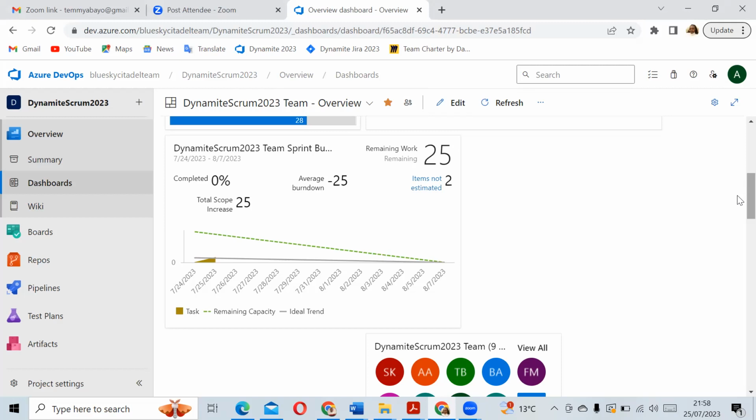Okay. So it's still not too late, because it's just 2 days into the sprint. Maybe when you meet tomorrow, I know your PO doesn't come to all your daily stand-ups, but you can get her in because you know what you want to do. And like I said, the PO is the only one that has the authority to remove a story from the sprint. So you as a team can't do your daily stand-up and say, it's too much, let's remove this and this and this.